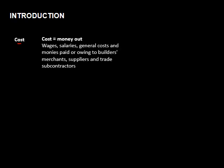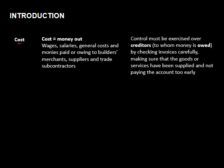It's all about cost. Firstly, we look at cost — it's basically your money out. It's salaries, wages, general costs, merchants, supplies, etc. And control must be exercised over your creditors to whom money is owed, by checking invoices carefully, making sure that the goods or services have been supplied, and not paying the account too early.